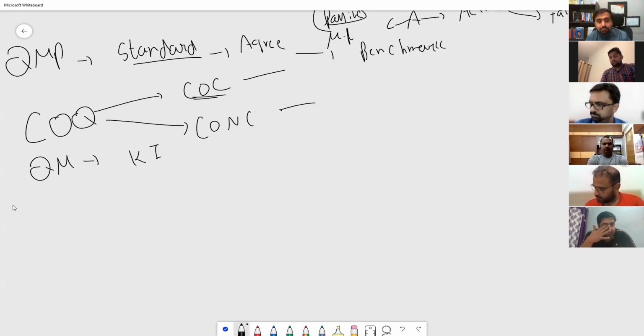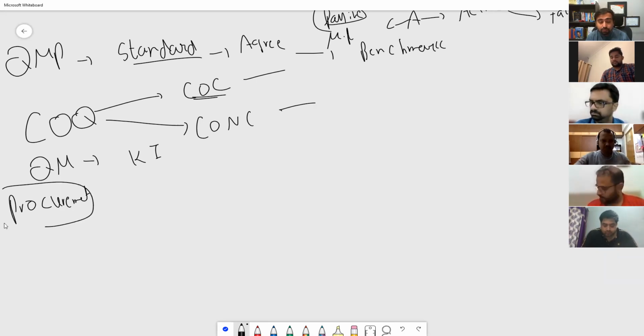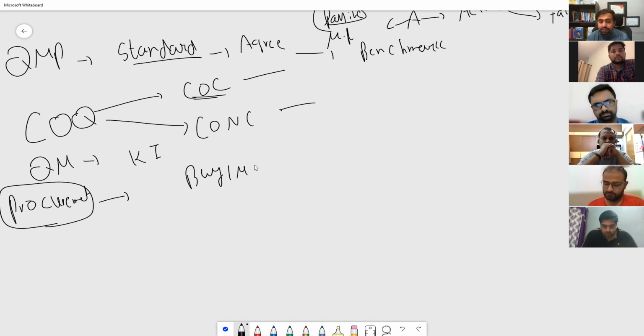The next is basically what we do in the planning phase of procurement. Now, procurement is very heavy when it comes to the planning phase. In the procurement planning phase, basically the first thing you decide is whether to buy or make. Let's say we have made the decision to buy, then we select source selection criteria, how we are going to categorize our source. Then we see the contract type.